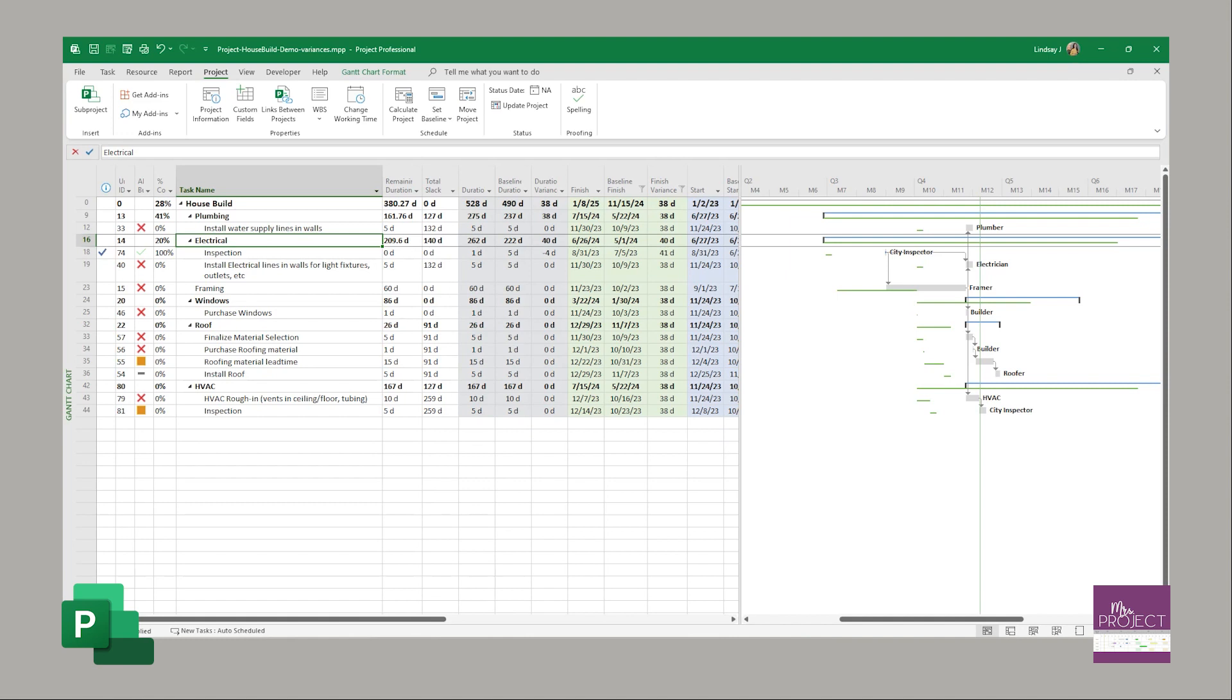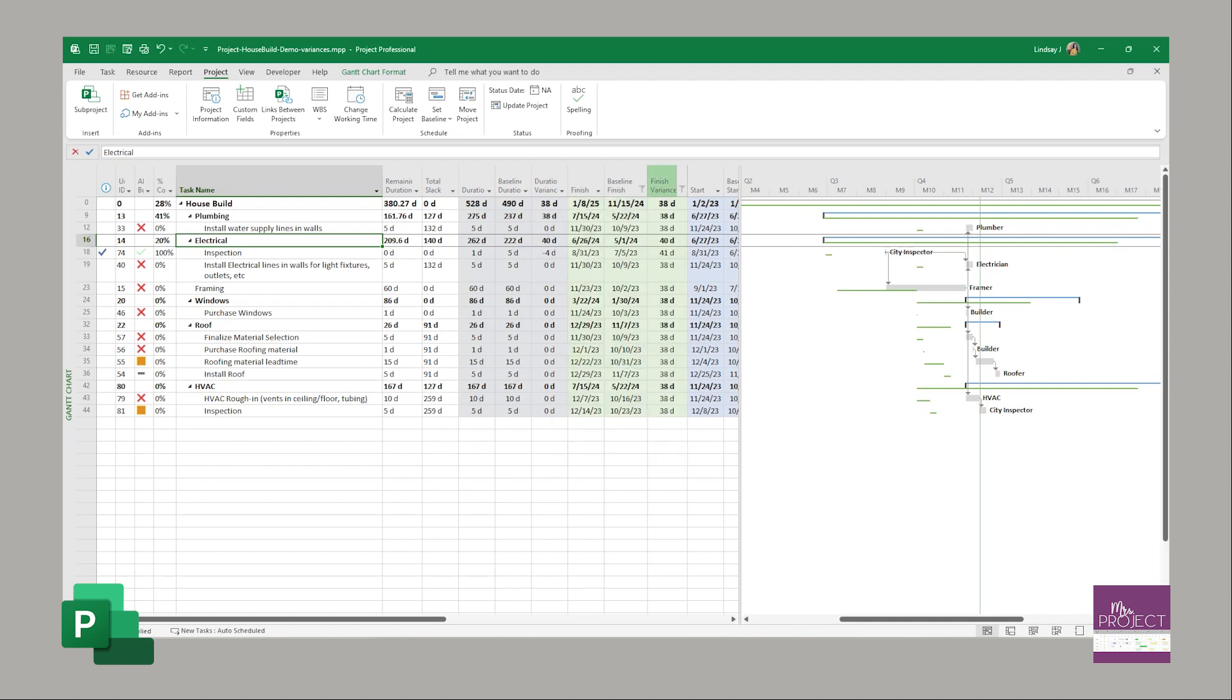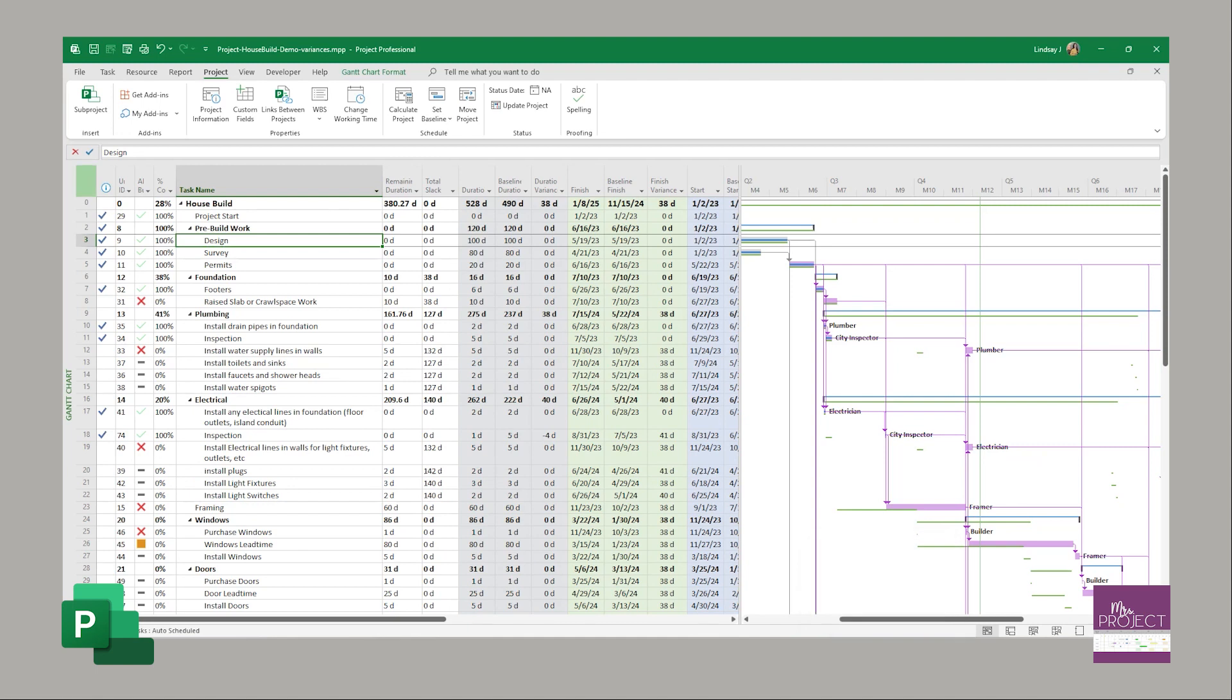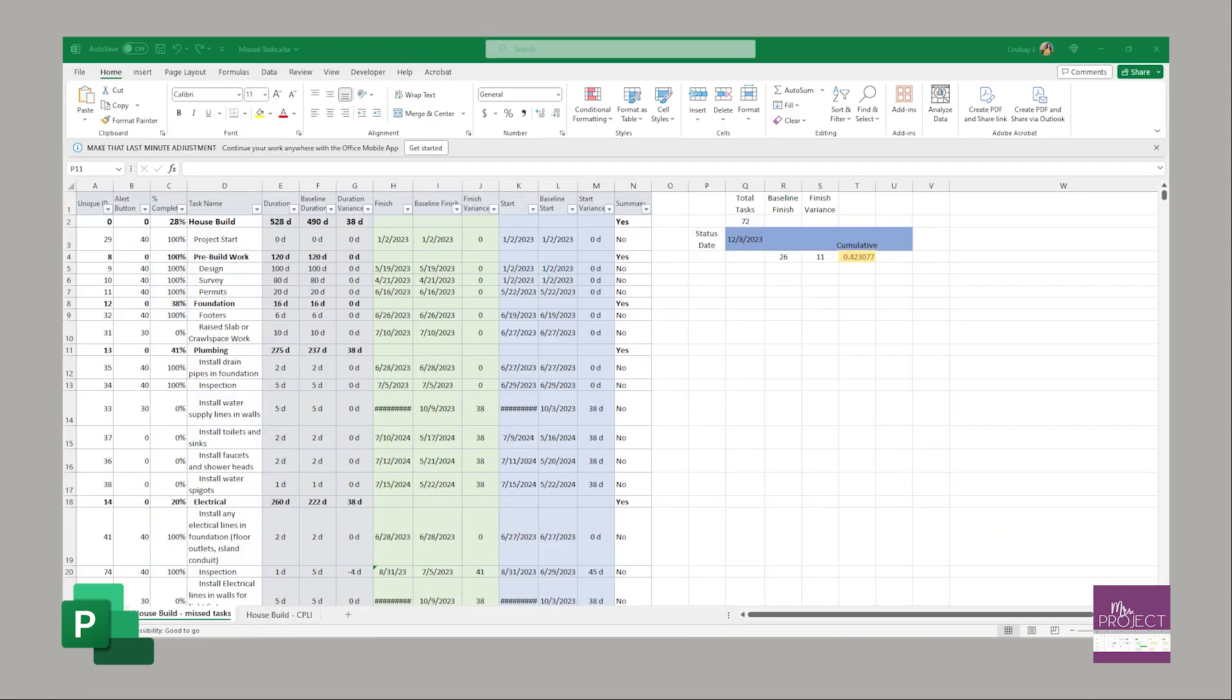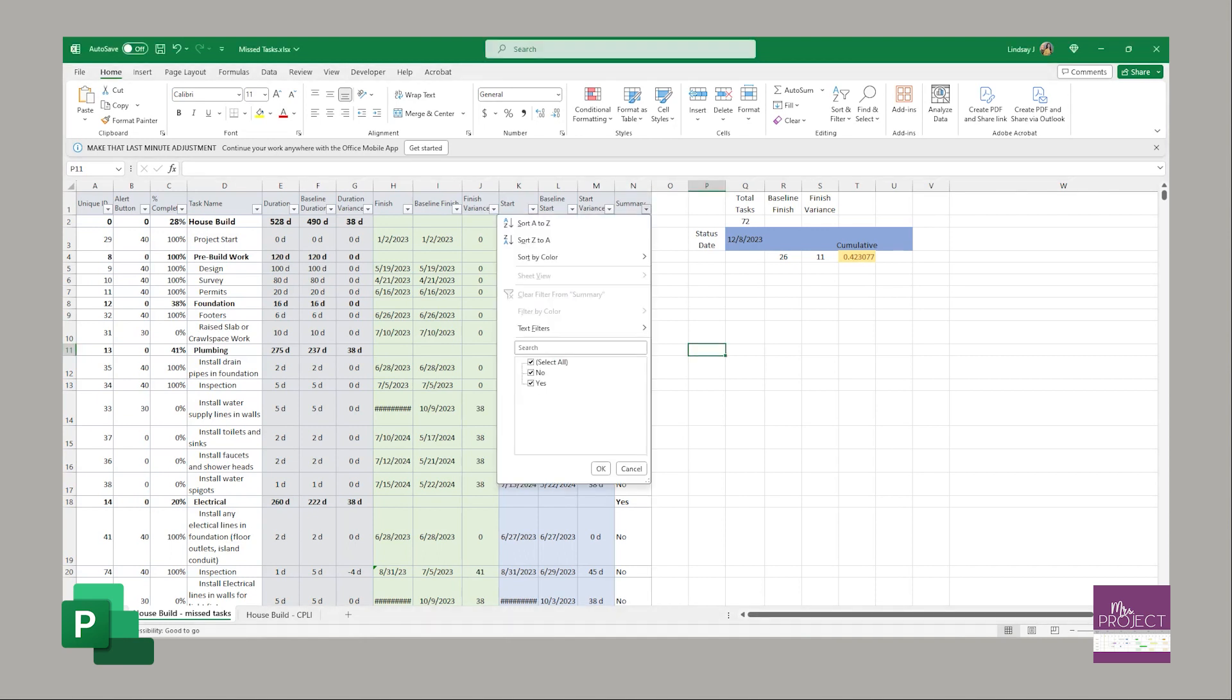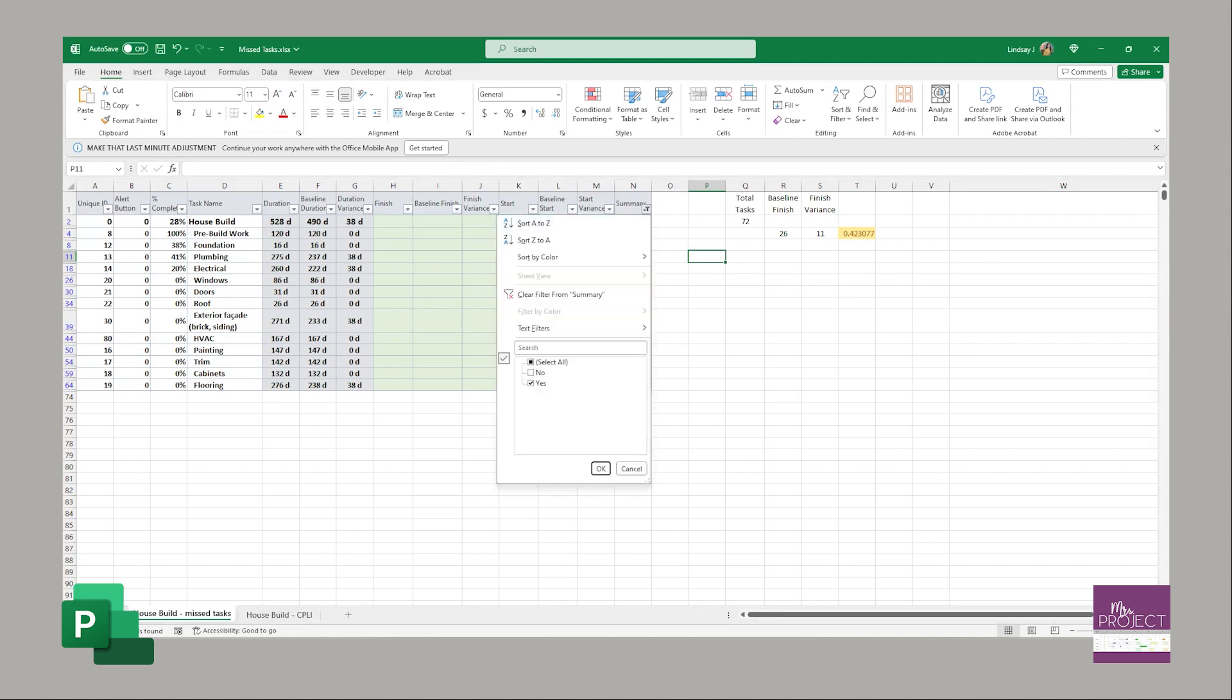If you had a much bigger project - this one only had 72 tasks - the easiest way to do this is let Excel calculate it for you. I'm going to take this data that I have and copy and paste over to Excel to get that information to do an easier count. It's quick and simple. You can highlight all of these, copy, and then paste in Excel. I put those columns in there and I made sure I did have the summary column checked and pasted in here as well. Then I filtered on all the yeses and deleted the data associated with that summary, because we don't want Excel to calculate the summary tasks - they're summaries, not detailed tasks.